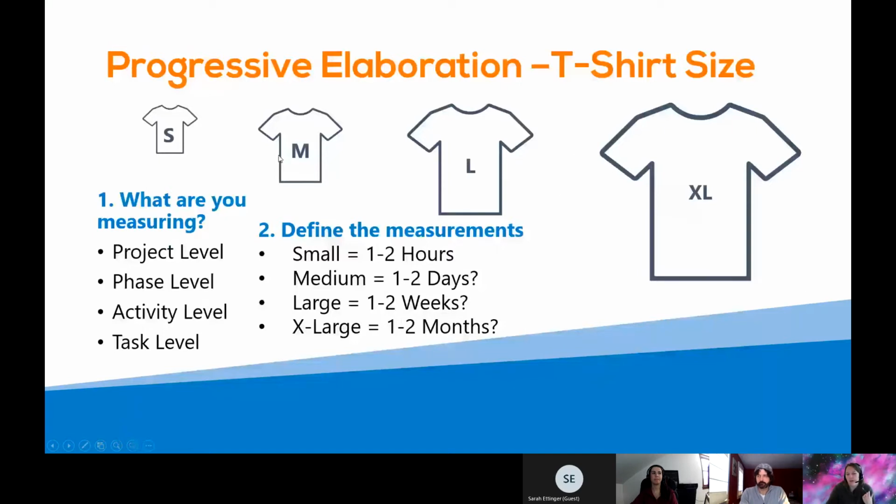Most importantly, this is typically a range. So if we're talking annual planning, budget planning, etc., usually it's 1 month, 1 to 2 months, 3 to 4, 5 to 6, year plus, or something like that.